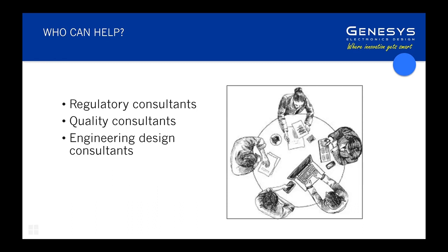So that's a very important aspect to look for. And then just the last bit is whether the proposed mitigation adds a new risk or not. Again, sometimes people do it, but they don't document in the report that they're confirming whether the mitigation did not introduce any new risk. That's it.